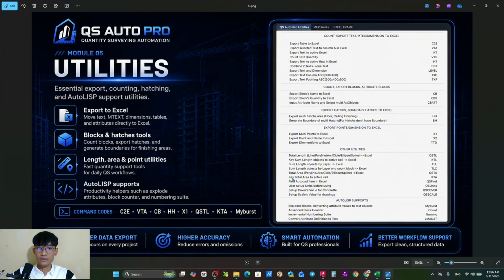The most important and useful one, as I mentioned earlier, is define AutoCAD, which you can see in the Excel. This is really useful when a design change happens after you have done your quantity. The designer comes and says, we have a design change on the beam or parquet or the column. All you need to do is go straight to the previous detail and click on it. You will get directly to the Excel where you have the quantity already, and then you just go in there, check, and revise based on the latest detail. That's it. It's really helpful and saves us a lot of time.